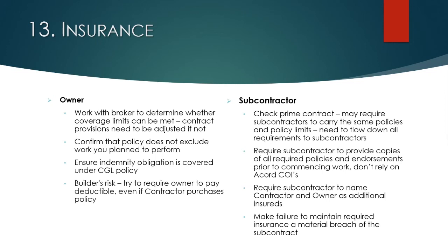When it comes to the subcontractor, get the policies. Don't just rely on the certificate of insurance. That's not insurance. I've had situations where we got a certificate of insurance from a subcontractor. The client thought that it was an additional insured. The certificate of insurance was not accurate, and we did not have additional insured coverage, so that was a problem. So make sure that your subcontractor provides copies of all the required policies and endorsements before they start working on it.